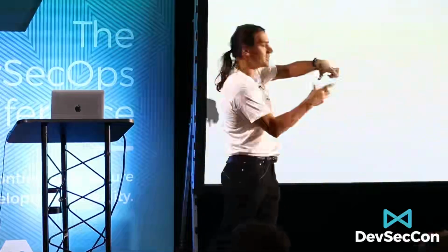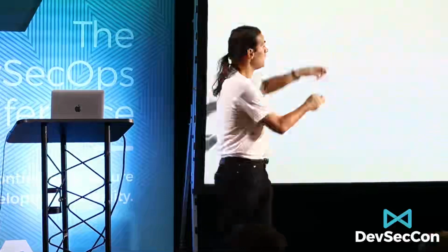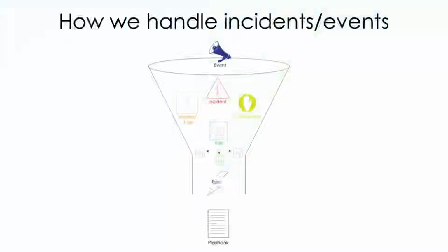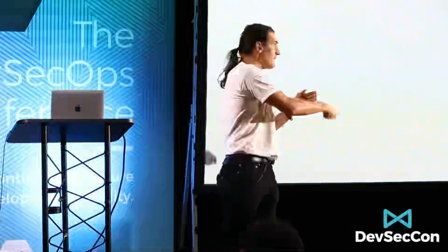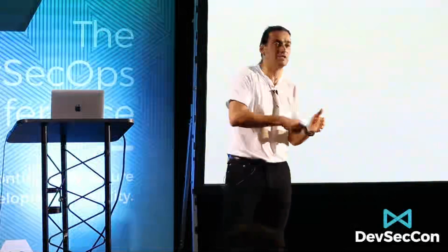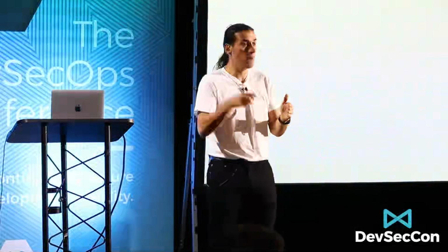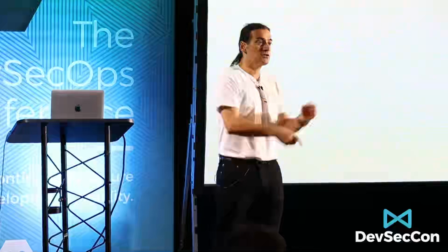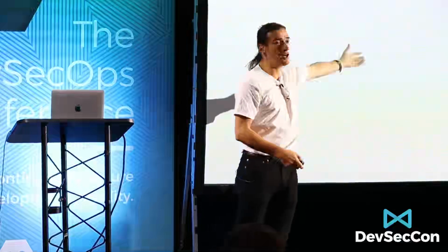And then the magic of all of this happens when you capture this in the playbook. The playbook, which is something that for the guys that went to the last summit, we started to work on, becomes this sort of what to do. The reason why we already, for example, opened 20 tasks straight away is because we've already done some of these exercises. So we already know the 10 tasks or the 15 tasks that we want to do when this incident occurs. This is where it becomes less of an art and becomes proper engineering, proper processes.